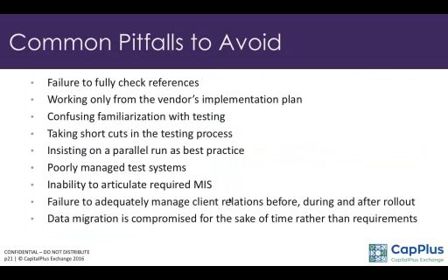Also, please don't work only with the vendor's implementation plan. You need to have your own implementation plan. Take for instance, even before a project starts, you need to start planning, saying, okay, we need to assign people, we need to ensure that our manual of procedures is in place. Have you updated the procedures? How are we going to do the data migration? Whether our data is clean, whether our data is audited. Stuff like that needs to be done long before the vendor comes into your institution for the implementation.